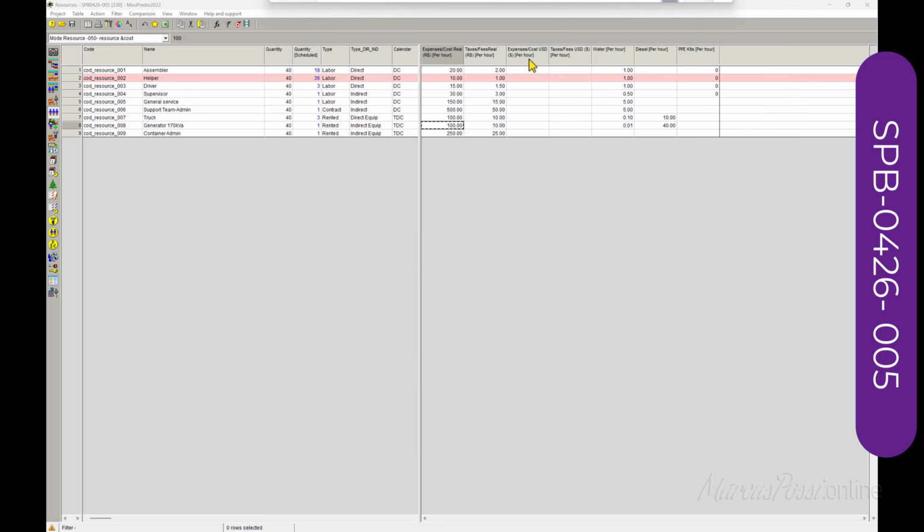Why am I reading in such a precise way? Because it's used to rent a generator by month and the container service by month, and you are registering here by hour, because our system is paid by hour, not by month.